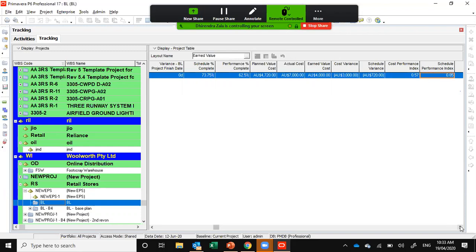Once you get a negative variance in both cost variance and schedule variance, definitely your estimate will increase. Now it shows you have a budget at completion of 6,400, but as you progress in the future, you have to spend more to complete the project.